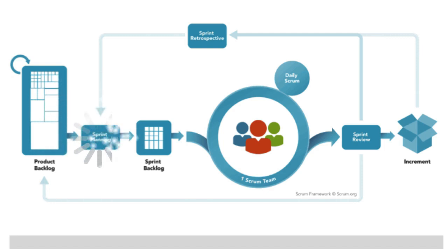The sprint planning meeting takes place on the first day of a sprint and is used for the Scrum team to plan the work for the sprint. The artifact produced and managed by the development team to keep the sprint plan and their progress is called the sprint backlog. This artifact also includes what features will be added to the product this sprint. Not only does the team plan at the start of each sprint, but they also perform inspection, adaptation, and planning every day in a 15-minute event called a daily Scrum. Some people call these daily stand-up meetings, but it's not a requirement in Scrum that they stand up. In fact, a daily Scrum could be a trip to the coffee shop together, as long as the team agrees and still talks about what a daily Scrum covers.